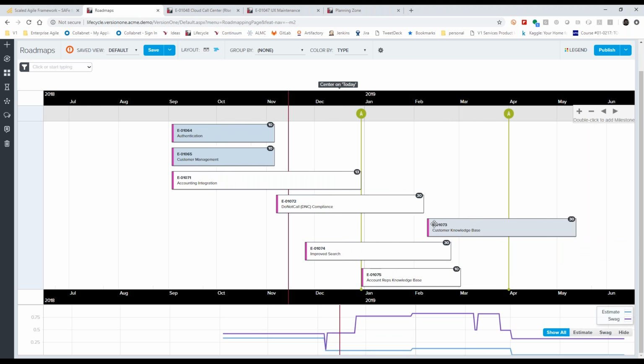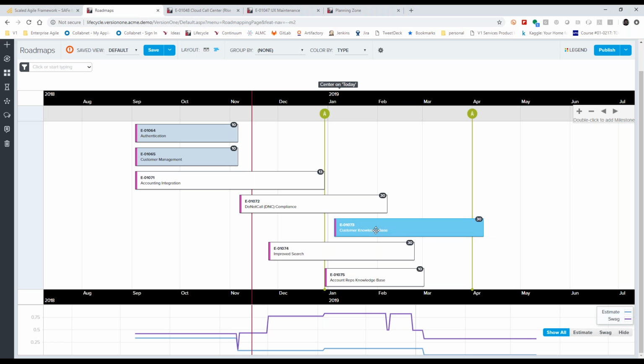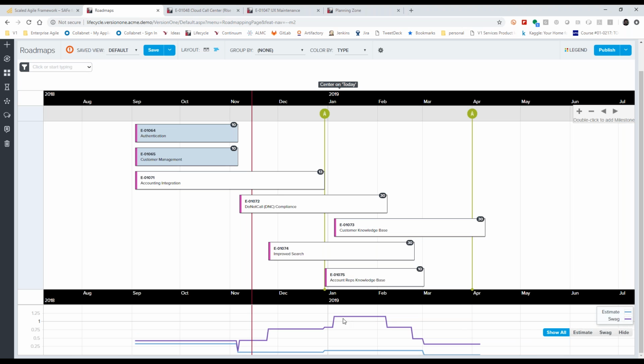Right, as I'm scheduling items, when I have overlaps that increase the demand in the future, this is going to be an indicator that I need to reschedule to level this out to something more manageable, or it's an indicator that I need to start staffing up for this particular event. Hopefully that helps. Great.